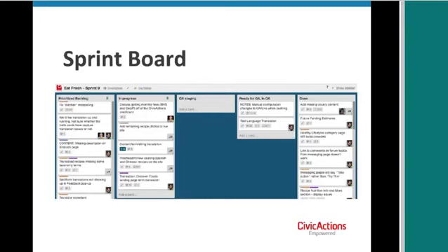Many teams have what they call a definition of ready. So an item needs to have, they decide as a team, before you give this work to us, you need to have these three things. And especially in an organization where there's a lot of governance concerns or regulatory stuff, there may be regulatory things that need to be answered before you can even work on it. And that is identified in backlog grooming.